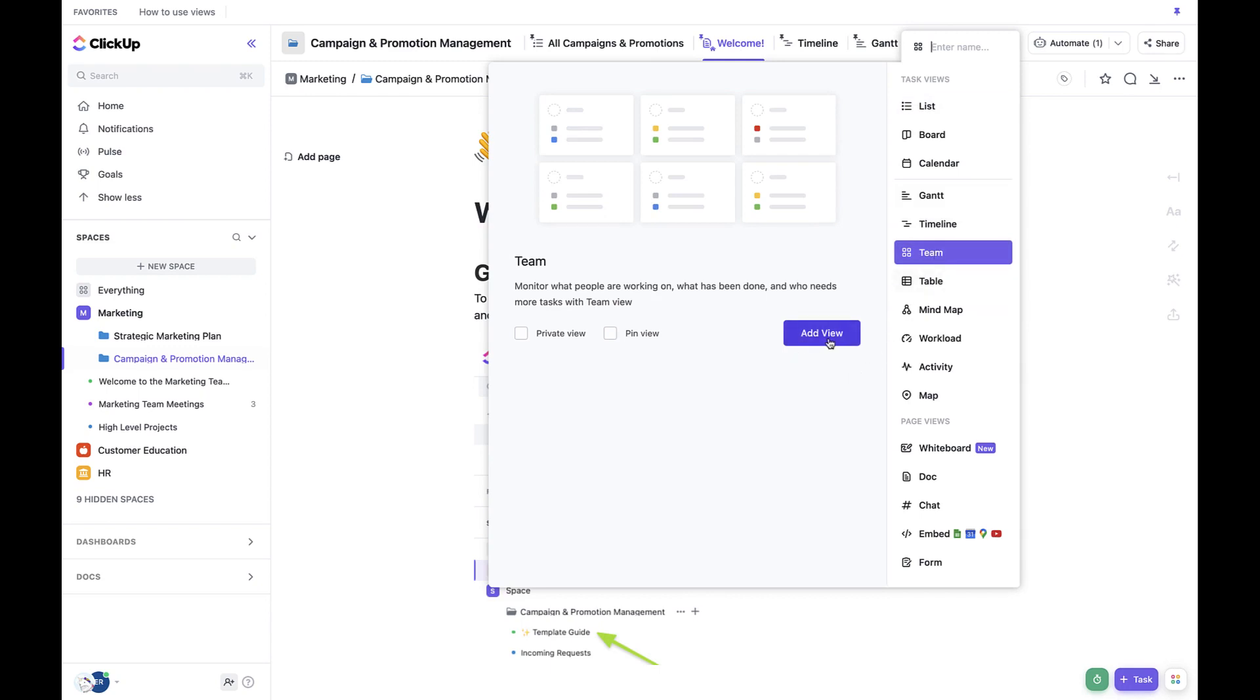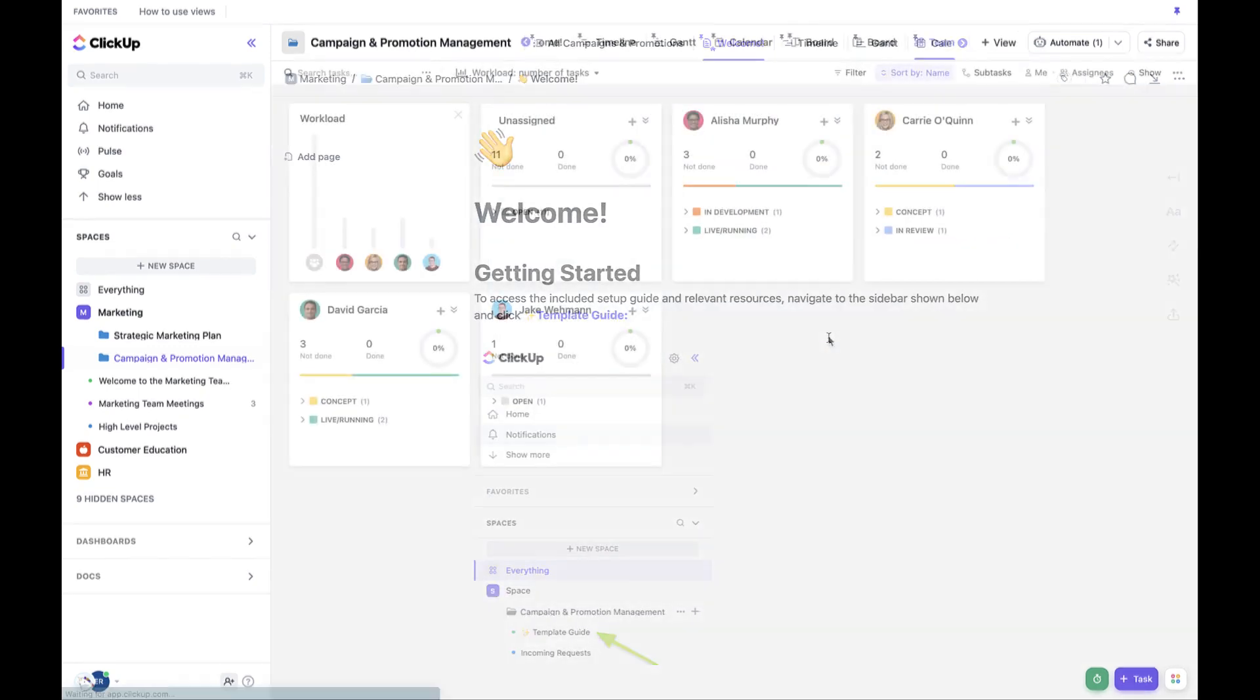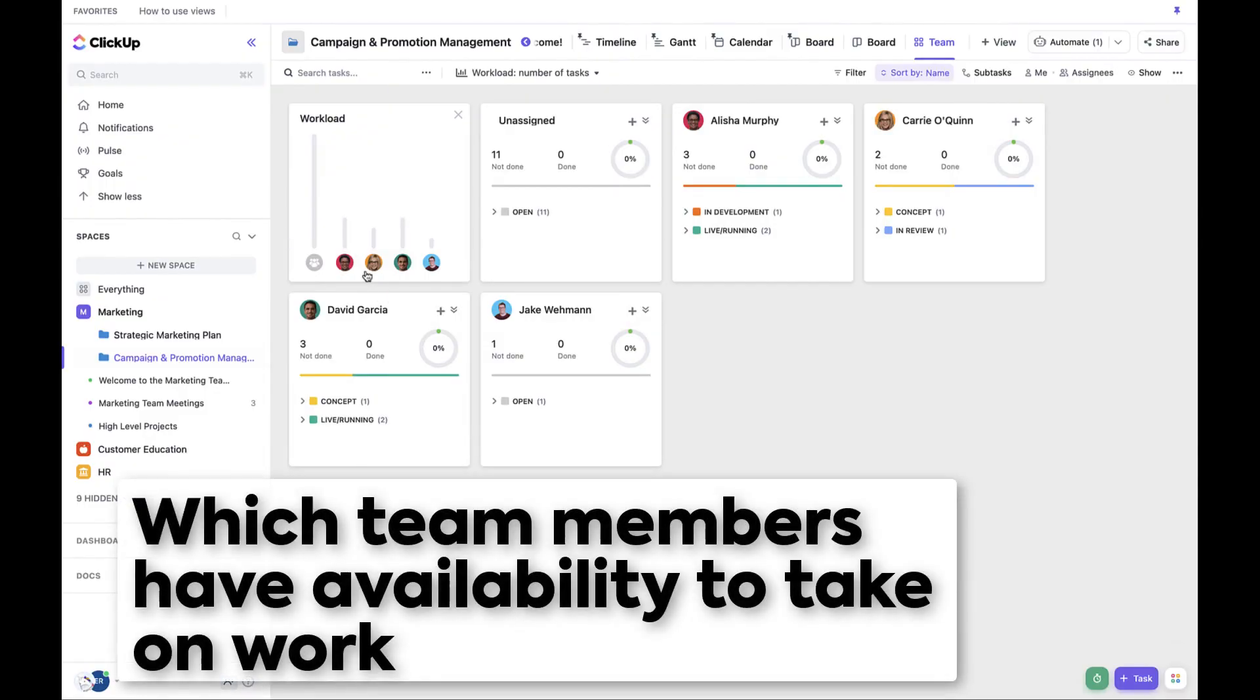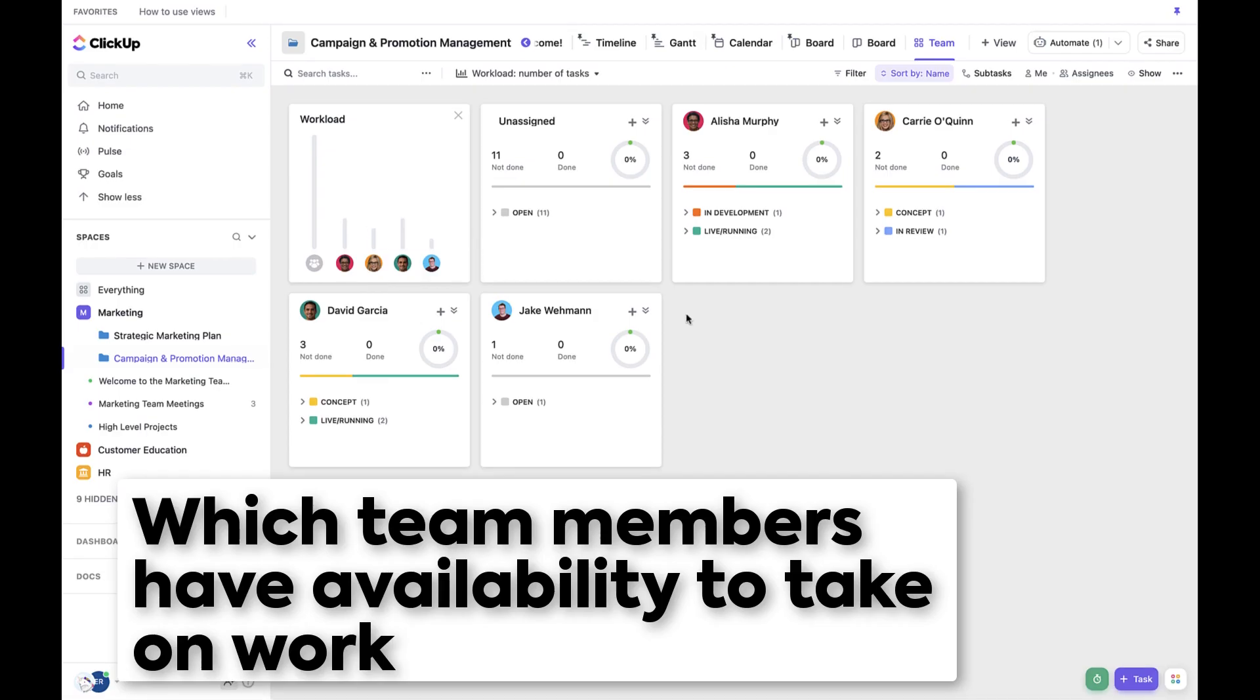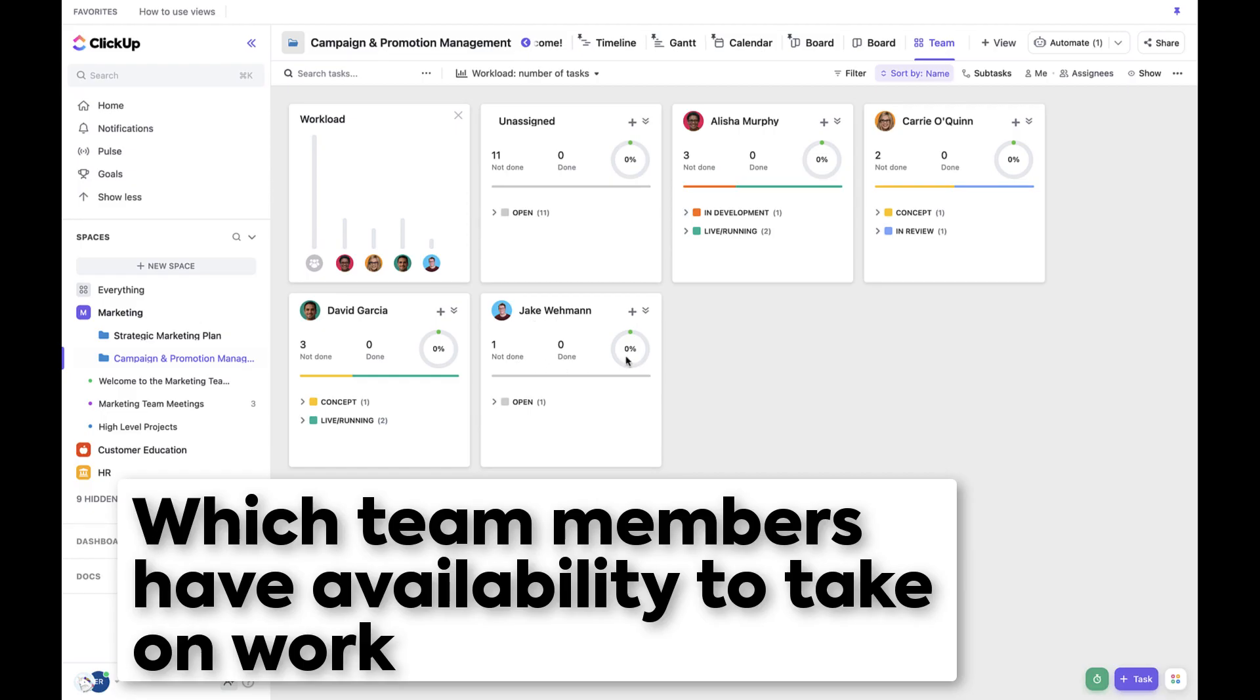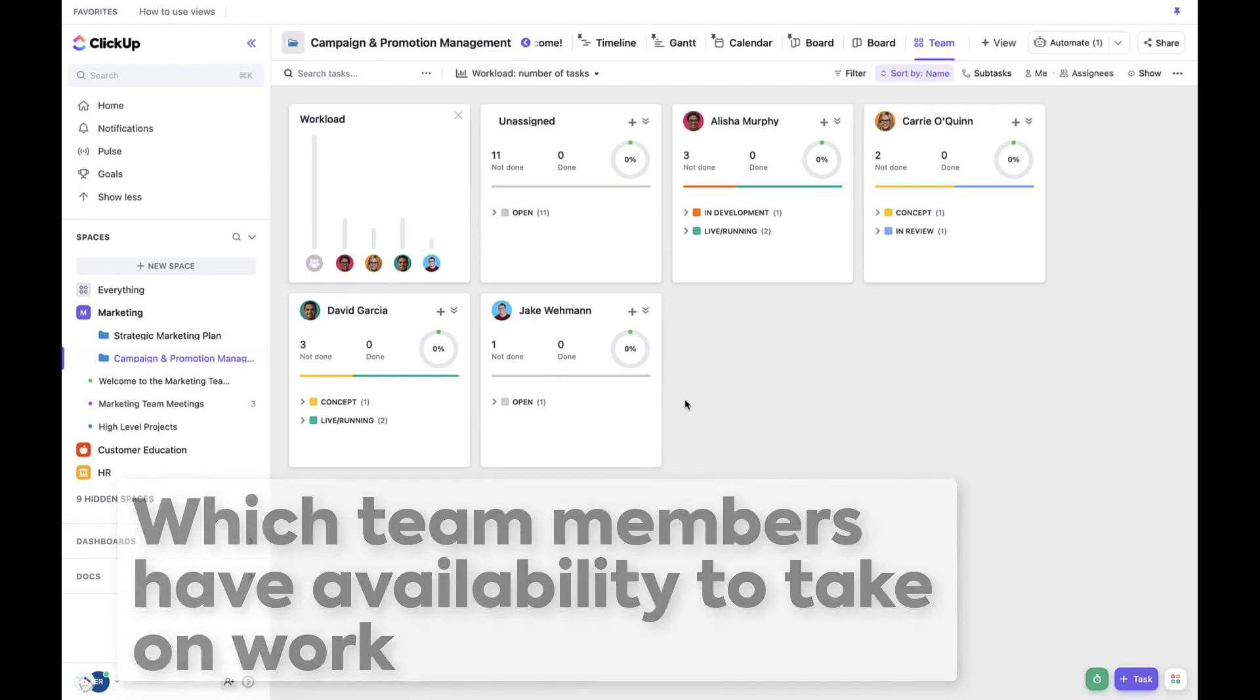Now that I've added the team view, I can see very clearly which team members have availability and which ones are busy. From here, it looks like Jake has additional bandwidth. And so I'd feel comfortable assigning this project to Jake.